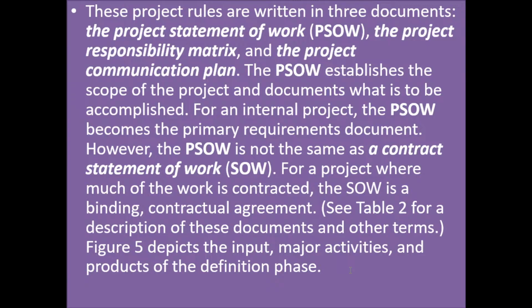So the project statement of work, PSOW, establishes the scope of the project and documents what is to be accomplished. For an internal project, the PSOW becomes the primary requirements document. However, PSOW is not the same thing as a contract statement of work, which is SOW. For a project where much of the work is contracted, the SOW is a binding and contractual agreement.